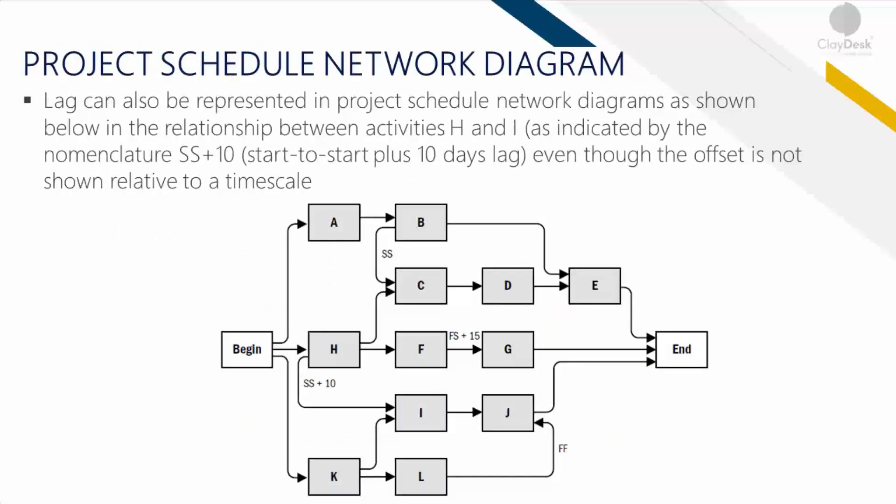Here's the project schedule network diagram — lags can also be represented in it. For example, the relationship between activities H and I is indicated as SS plus 10 days lag, even though the offset is not shown relative to the timescale. Based on your own project requirements, you can schedule and adjust accordingly. That's an important role of the project manager: using the right tool, understanding it, and then managing the project.